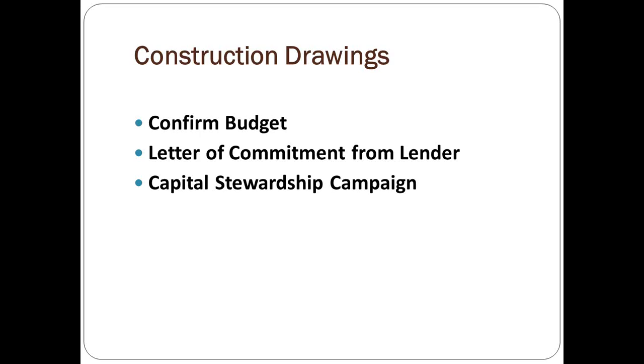Maybe your first fruits offering is there, and all you've invested thus far is putting your team together in-house and industry professionals and the cost of this master plan, the survey, and the tests that go on your property. You're trying to make certain you spent money well spent up front before you release the industry professionals to spend a lot of money on construction drawings, detailed construction drawings, and then, of course, move into construction. So you have your lender and your fundraiser that you want to know as you take your budget.